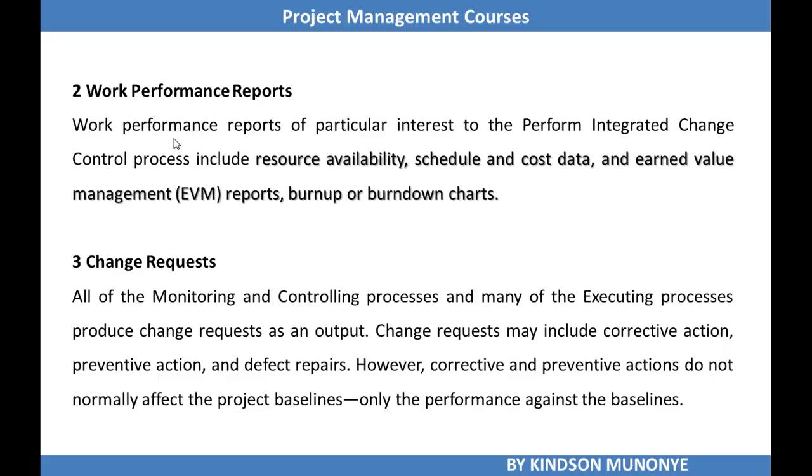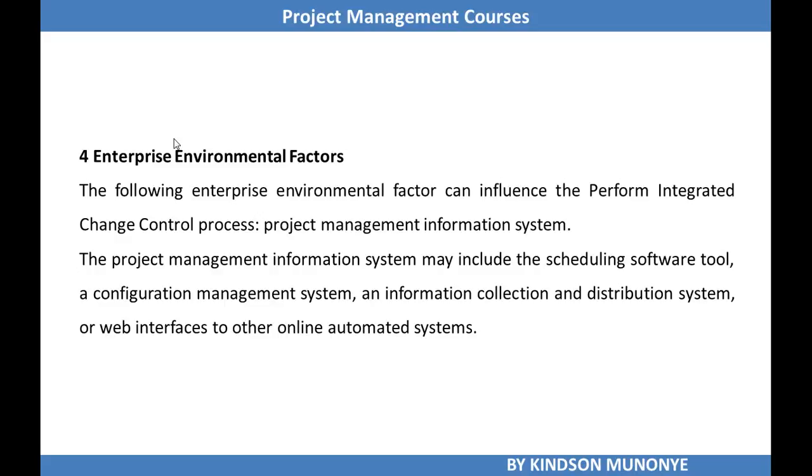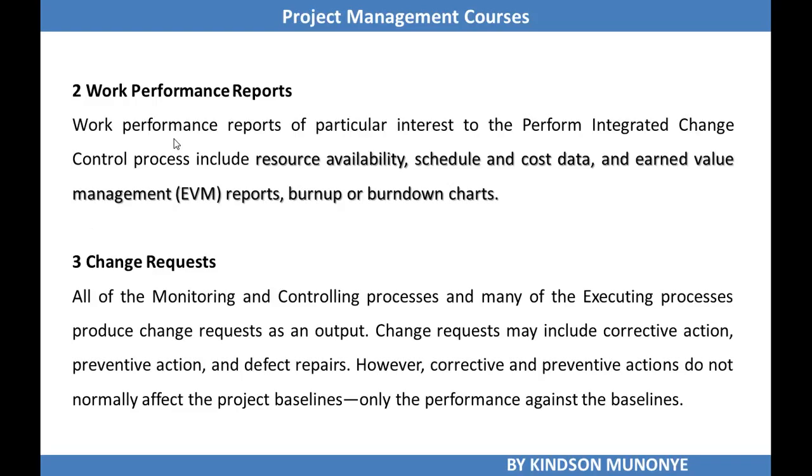Another input is change requests. All of the monitoring and controlling processes and many of the executing processes produce change requests as output. Change requests may include corrective actions, preventive actions, or defect repairs. Change requests serve as input to Perform Integrated Change Control because this process is going to take the change request and measure it against the baselines. It is going to check the impact on cost, time, quality, and every other knowledge area across all the knowledge areas. So the change request is an input to the integrated change control process.